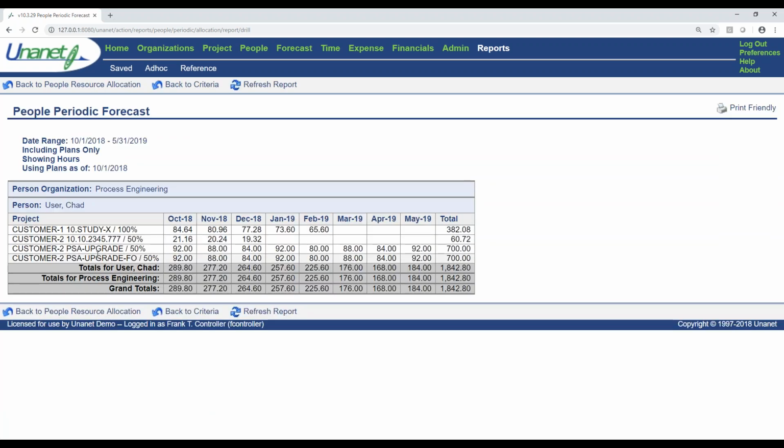Let's click on Chad and figure out what happened. Okay, so this Study X project is a one project, it's 100%. So we're performing this work and we can see that. But this 777 project, this PSA upgrade project, all of these, I just have a 50% chance of winning. And so we've applied a weighted forecast and adjusted these hours based on the likelihood that we're going to win it in the system.